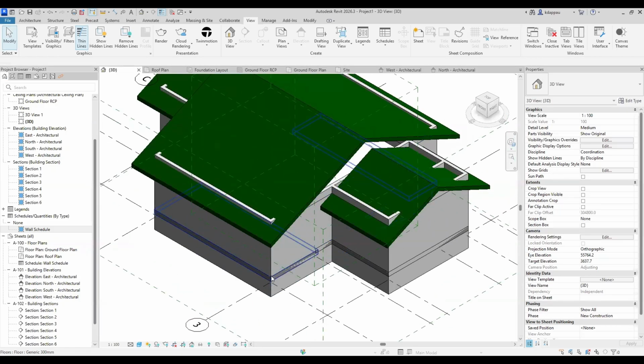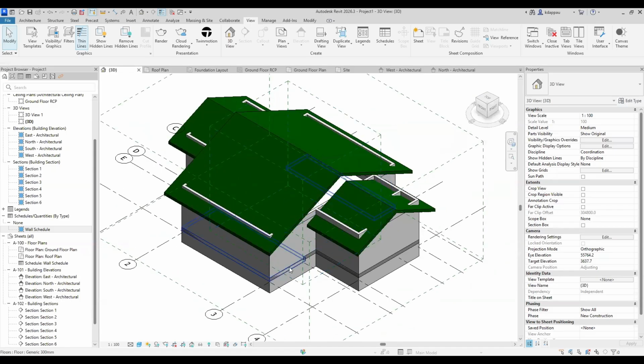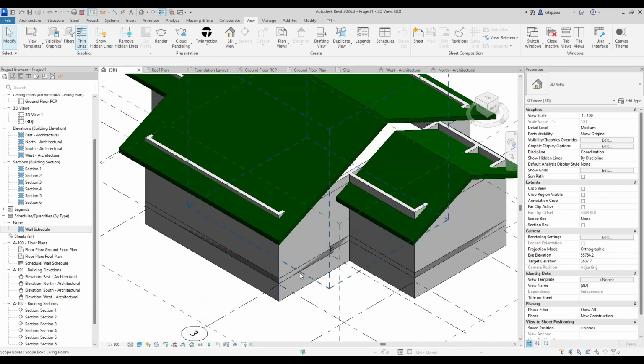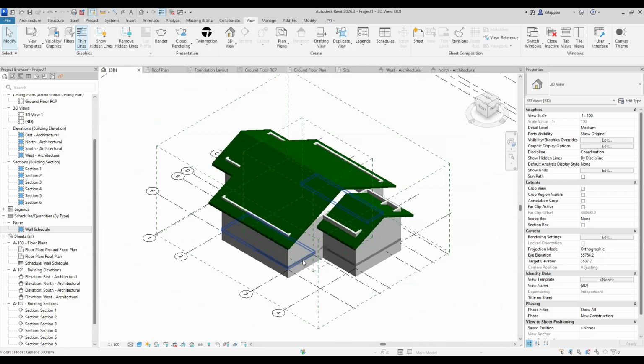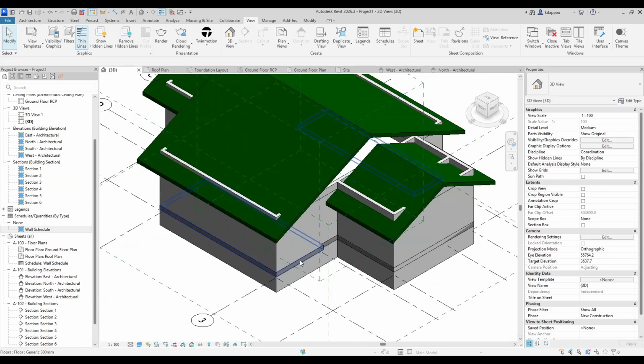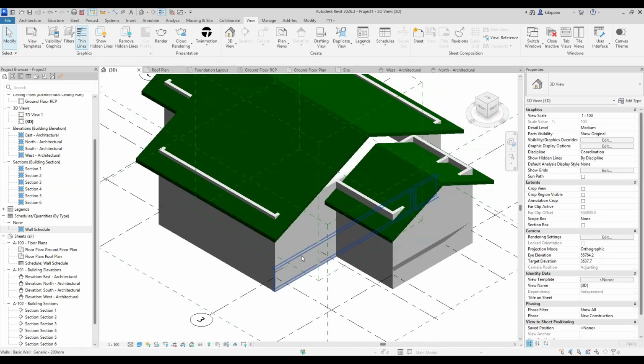So when the Chinese did the estimates and brought the estimates to my boss, being an experienced man who has worked on several projects, he doubted the values that the Chinese presented to him. Okay, so he called me down. These values that the guys are presenting to me for this manual, I'm not too sure because I guess they've overinflated the values. So what can you do about it? Okay, so I said, let me go and model the whole cladding for the building and then do a schedule and then find out the total area that is supposed to be used for the cladding.